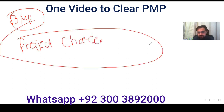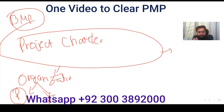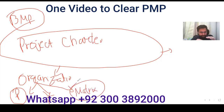With the help of these benefits, you finally make a project charter. A project charter gives formal authority to the project manager and formalizes that the project can start. After the charter, your project begins formally. You also need to know what type of organization you're operating in: a projectized organization where the project manager has complete authority, a functional organization where the functional/operational manager has authority, or a matrix organization where responsibility is shared. Unless stated otherwise, always assume it's a matrix organization.